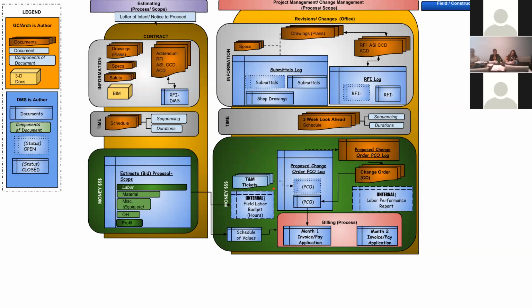In doing that, here's the pros of T&M. The pros of T&M, they're less likely to negotiate it because they verified the time that it took and the materials that it took. The con or disadvantage to it is that we only get to mark it up by 15%. And it's a tremendous amount of work for us as project managers because we have to read the guys' handwriting. We have to understand what they were doing.